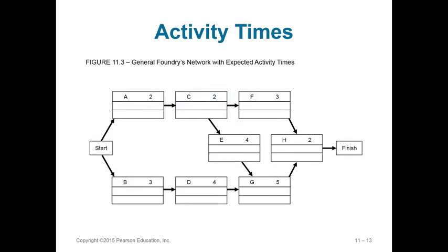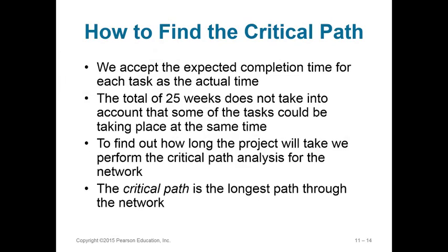So we put some activity times into that diagram that we had before, and that helps us to see a little bit better what our critical paths could be. Now, if you're going to have a completion time out there for this path, you have to also understand that the critical path is going to be that path that is the longest time from start to finish.